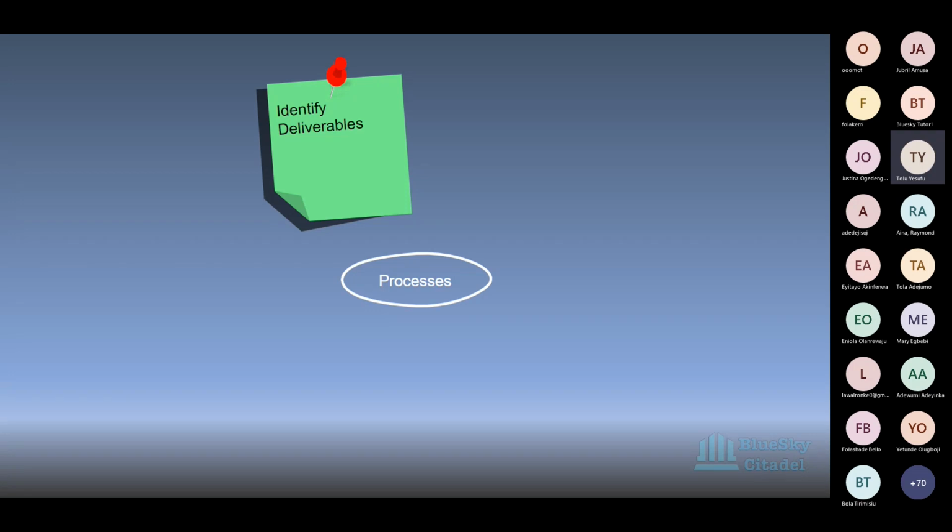So you want to make sure that when you go on a call with stakeholders to give them progress updates and you put up your roadmap in front of them, you don't put up a roadmap that goes into a deep level of detail. Some organizations have roadmaps, and they still have their plan, which is even more detailed. Some of those project plans, when you look at them, go as granular as even having the names of who is carrying out what activity. You really don't want to present that in front of stakeholders.